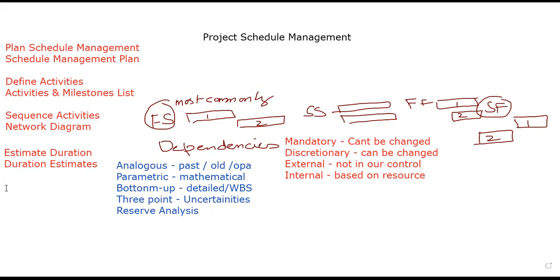So now we are in the position to develop the schedule. So the next process is develop schedule. Once you develop a schedule, you will have a project schedule, and it will not be called a baseline until it is approved. Once you make version 1, you will go to your organization, a PMO or whoever is there. You will show them, and then we will discuss, and there will be negotiations. And once approved, it will become the schedule baseline.